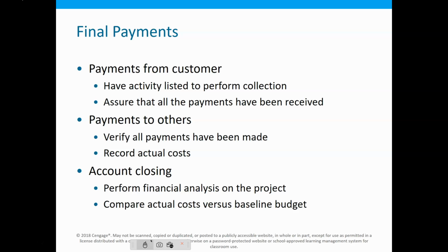That builder sets in a special escrow type of an account. So in other words, I can't really touch it. A fee. And so we've negotiated that at the beginning that there is something like usually a 10% fee in there. That fee sits there for a set amount of time. So maybe it's 90 days, maybe it's a year, maybe it's 6 months. That way, if problems arise in that house, they're paid out of that contingency. So I haven't paid my builder. So I've paid them 90%, for example, of everything due. I don't pay them that final 10% until a year out.